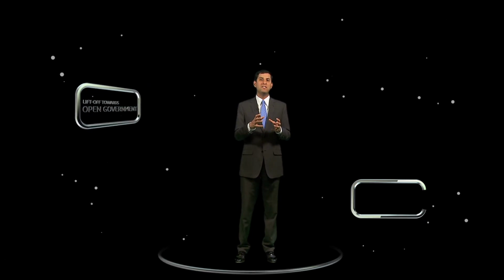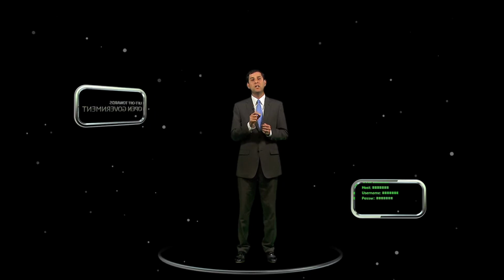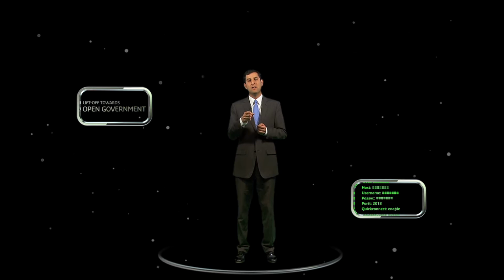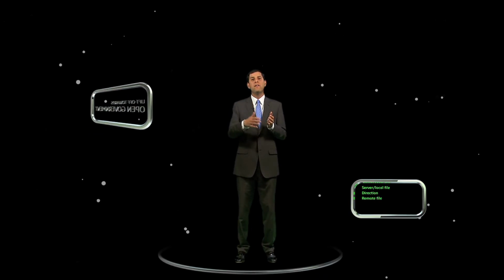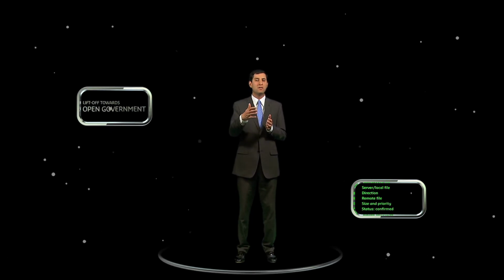Right after that, we launched these TechStat accountability sessions. What these TechStat sessions are essentially is about bringing the right people around the table to problem solve how these investments are performing. For example, we looked at just 35 IT projects across the federal government. And from those 35, we were able to reduce the IT budget by $2 billion. But more important than the budget reduction was the fact that we were able to accelerate the deliverables of those investments. Some of these investments, by the way, had deliverables that were 5 to 10 years out. And we were able to accelerate them on average to 8 months instead of these long cycles.